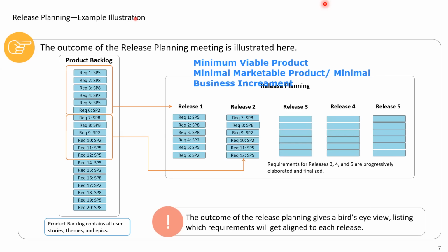Can MVP and a prototype be the same thing, right? See, not always. Because a prototype can be as small as a paper prototype also. Whereas MVP is the minimum functionality that you have to develop to assess whether the project will be a worthwhile investment proposition or not. That is MVP, minimum viable product, guys.